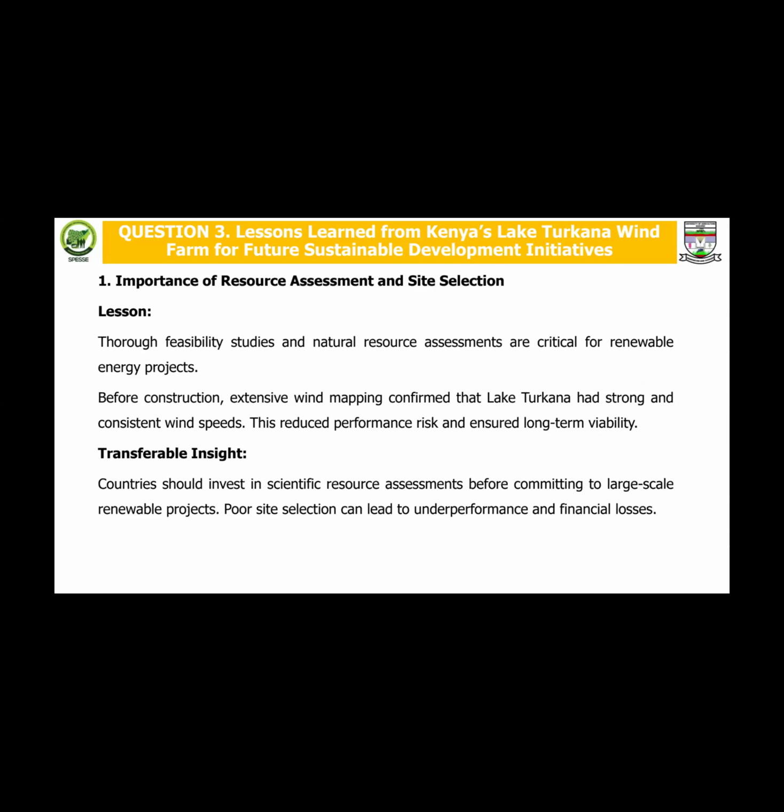Importance of resource assessment and site location. Lesson: thorough feasibility studies and natural resource assessments are critical for renewable energy projects. Before construction, extensive wind mapping confirmed that Lake Turkana had strong and consistent wind speeds. This reduced performance risks and ensured long-term viability.